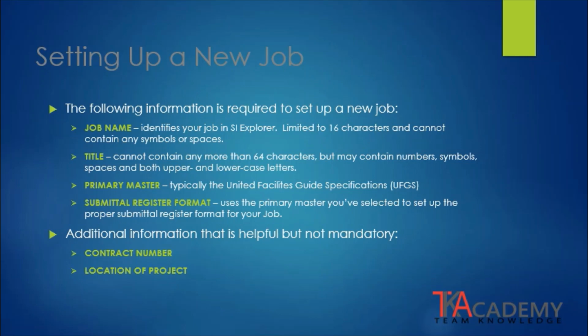While setting up a new job, you are also required to identify what the source is for your primary master. In most cases, this is usually the United Facilities Guide Specification, or UFGS. You are also required to identify the submittal register format. The submittal register format references the primary master you have selected. If you have identified the UFGS as your primary master, then the submittal register format is automated and there is nothing else that needs to be done in this step.